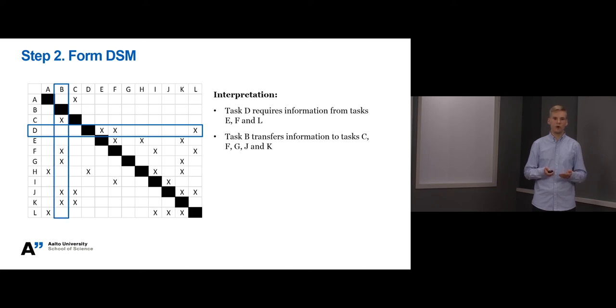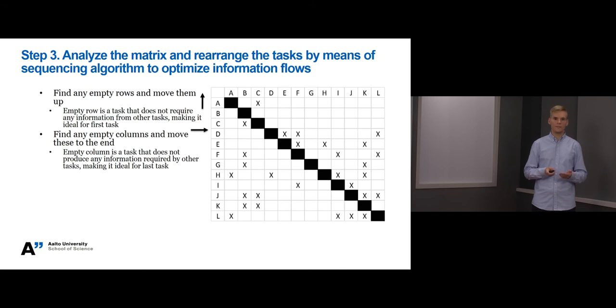Okay, let's move on to the third step. In the third step we rely on sequencing algorithm to optimize the information flows between tasks. The sequencing algorithm begins by identifying candidates for the earliest and latest tasks. In an ideal situation, the first task would require no information from other tasks, making it a suitable candidate to start the project. Respectively, the last task would not produce any information to other tasks, making it a suitable task to finish off the project. In this project alpha we can see that task B requires no information from other tasks. So let's move it up as the first task. Please remember to always move the respective column as well so that the diagonal follows correctly.